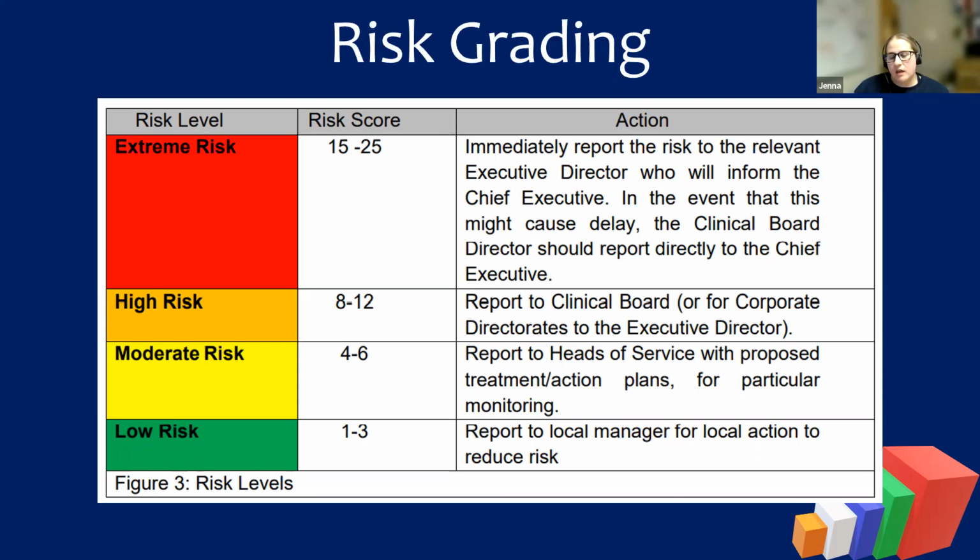So you've got your initial risk score, a risk score with controls in place, but then we have a target risk rating. And that risk rating is basically the level of risk that the department is willing to accept or tolerate. So that risk appetite comes back into play. So how much of a risk are we willing to accept with this? And that's really relative to your current risk score, and that might be the one with your controls in place.